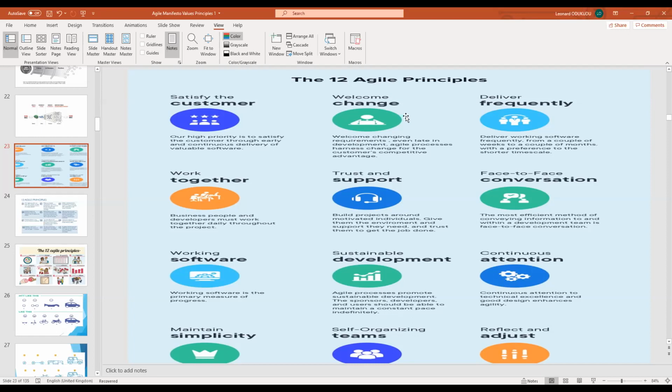That is one of the cultures in Agile, which is why your product owner in Scrum can stop your sprint if there's a major change, or rearrange your backlog to tell you, during prioritizing and grooming, that items 1 and 2 are what I want to focus on in the next sprint. And in the other sprint, I say, okay, we're not doing item 2 anymore, it's 3 now, based on the business requirement. So you have to get used to change.